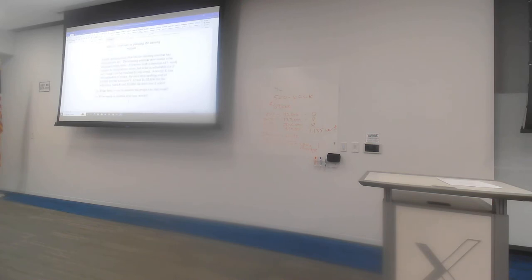And then after you've done that, and answered questions A and B, the proposed date for the training seminar has been pushed up. The training seminar now needs to be prepared in less time. Activities with a duration of 1 week cannot be crashed anymore, but what is scheduled for 2 or 3 weeks can be crashed by 1 week. Activity K can be crashed by 2 weeks. Given a unit crashing cost of $3,000 for activities C, D, and H, $5,000 for activities J and K, and $6,000 for activities E and F, what does it cost to shorten the project by 1 week? What would it cost to shorten it by 2 weeks? That is activity crashing and the financial impact of it.